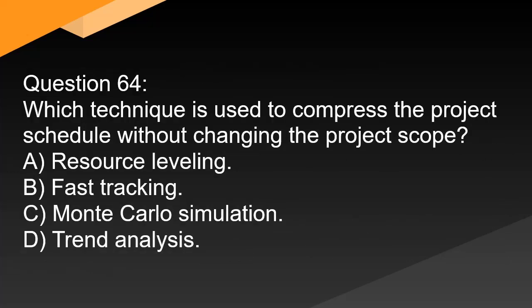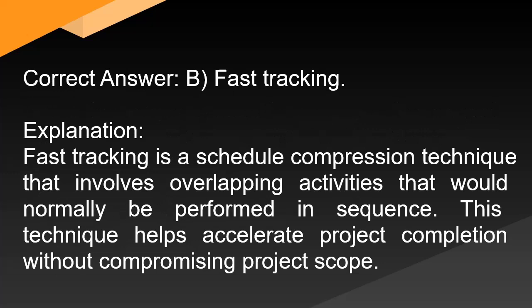Question 64: Which technique is used to compress the project schedule without changing the project scope? A. Resource leveling. B. Fast tracking. C. Monte Carlo simulation. D. Trend analysis. Correct answer: B. Fast tracking. Explanation: Fast tracking is a schedule compression technique that involves overlapping activities that would normally be performed in sequence. This technique helps accelerate project completion without compromising project scope.